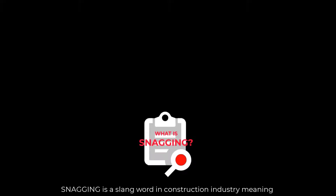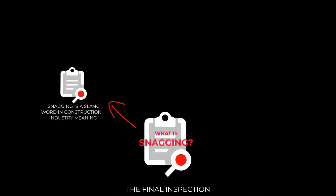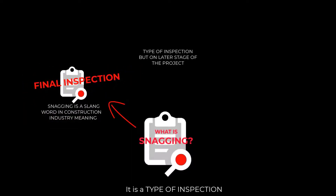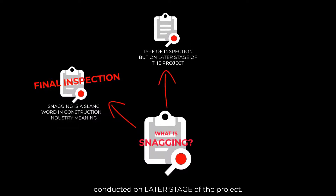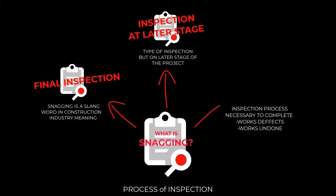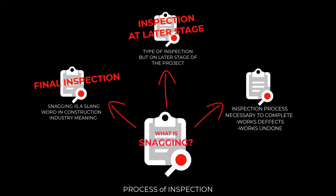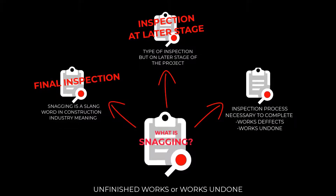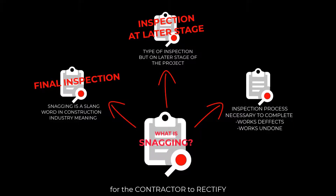What is snagging? Snagging is a slang word in the construction industry meaning the final inspection. It is a type of inspection but it is on the later stage of the project. It is also a process of inspection necessary to complete the work — covering defects, finish works, or works undone — for the contractor to rectify.